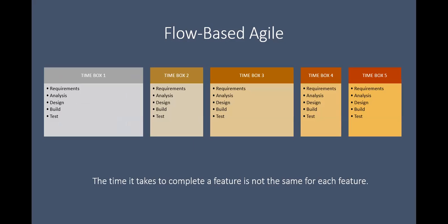Let's read a little excerpt from the book Kanban by David J. Anderson, speaking about the irregularity of flow. He writes, "Irregular flow of work can be caused by both external and internal sources of variability. Every single item pulled through a Kanban system will be different, different in nature to some degree, and different in size, complexity, risk profile, and effort required. The natural randomness of this will cause ebbs and surges in flow. A Kanban system naturally copes with this as long as the WIP limits are enforced, the work in progress limits.